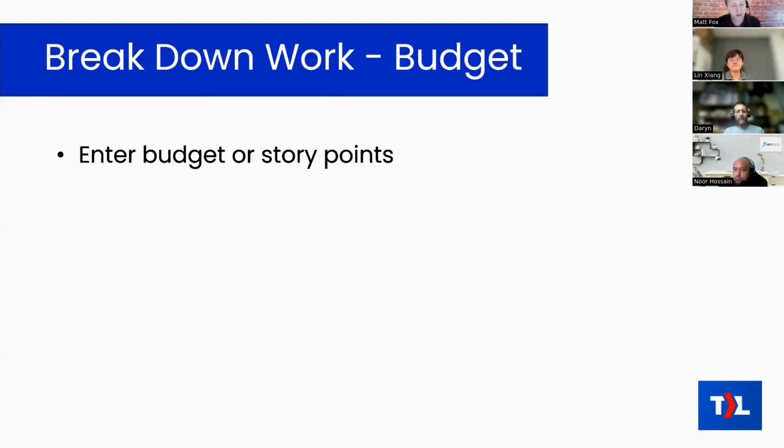Maybe something's not clear about it, or it could be that whoever is estimating it as a 13 is more experienced, and they know there's actually a lot involved in that. Or maybe the person who thinks it's a 5 says, well, no, we just did almost that exact same sort of work two weeks ago, so it's actually really simple because we just did that. Anyway, it brings out the conversation so that you can be on the same page about that work.